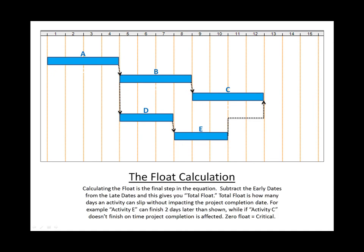Okay, now that we've got our early date numbers and our late date numbers, it's time to calculate the float and see what's critical. Here are the early dates we came up with on our forward pass, and here are the late dates from the backward pass. Now all we do is subtract the early dates from the late dates, and this gives you total float.